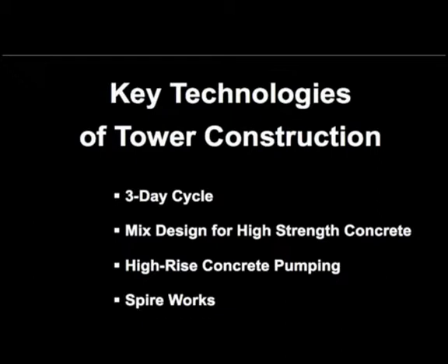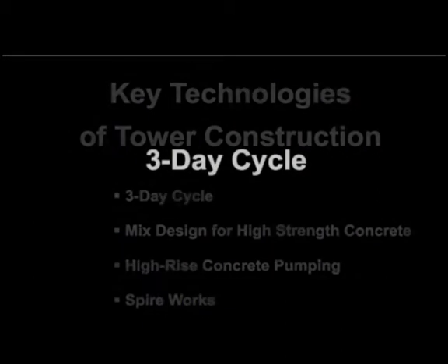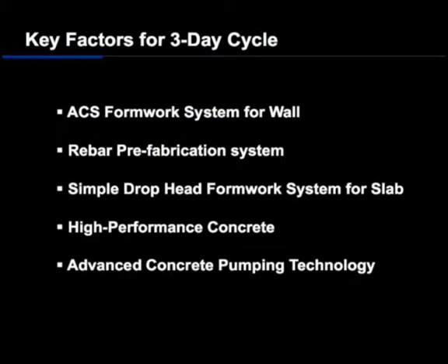Next item is the key technology of the tower construction. First, the 3-day cycle. We were supposed to complete this project within 47 months. So when we analyzed and finalized our master schedule, we decided to have this 3-day cycle for the typical floors.